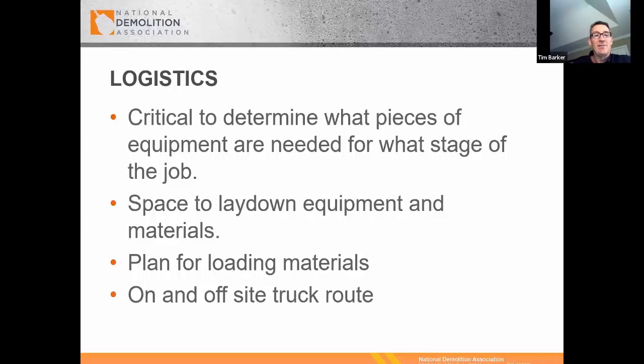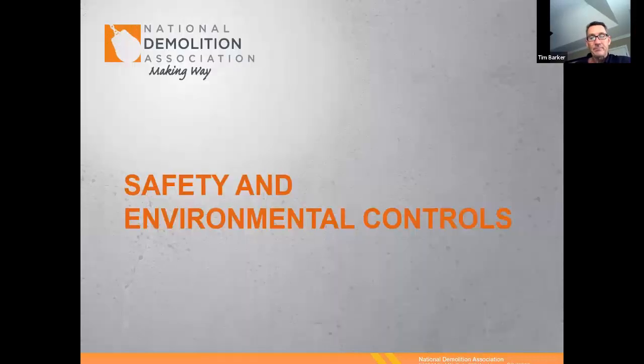Logistics is another thing you need to really be aware of as a project manager. And that can involve many things. Equipment being used on the job, when it shows up, when it goes. Do you have lay down areas to offload the equipment? Do you have enough space or room to load the materials into trucks on and off site? Do you have an on-site truck route?